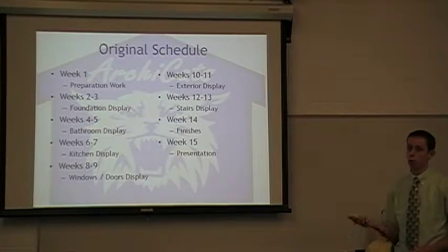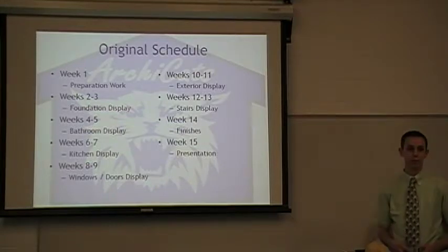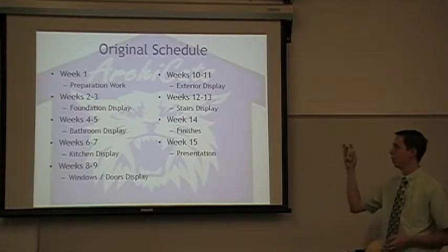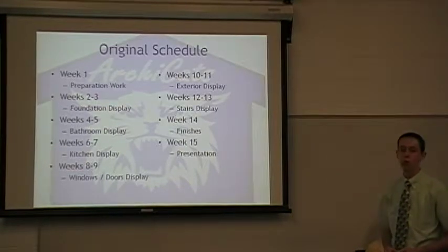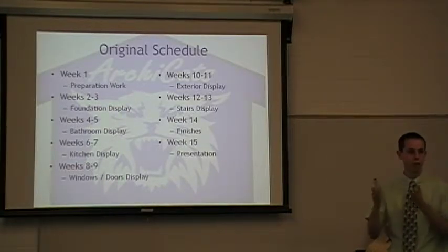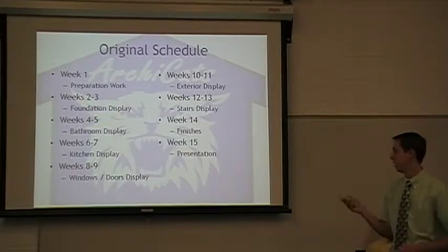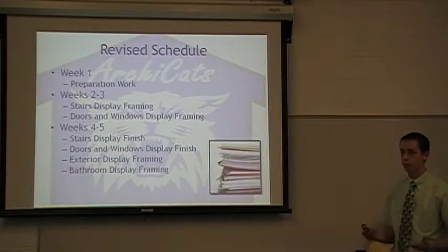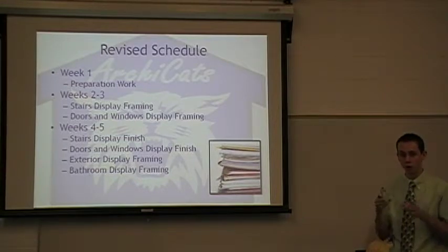The original schedule was what we talked about last semester. We had just a brief, rough idea of what we were going to do. We had originally thought about doing 2 weeks per display and finishing each one after we've started it, as you see there, and then that left us a little bit at the end of the semester to do the finishes and presentation.